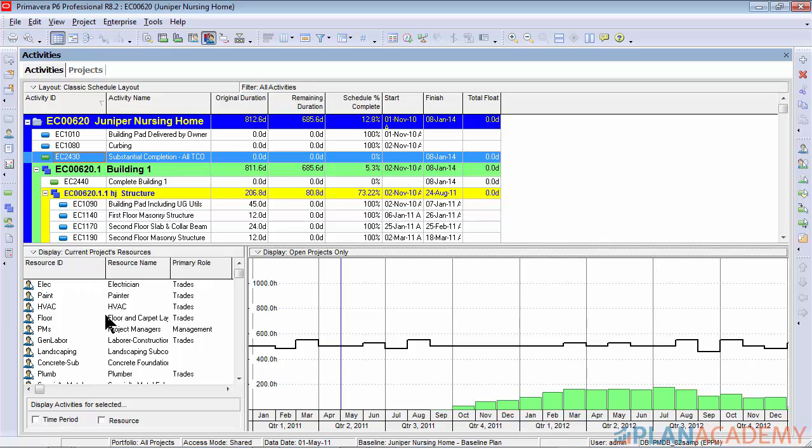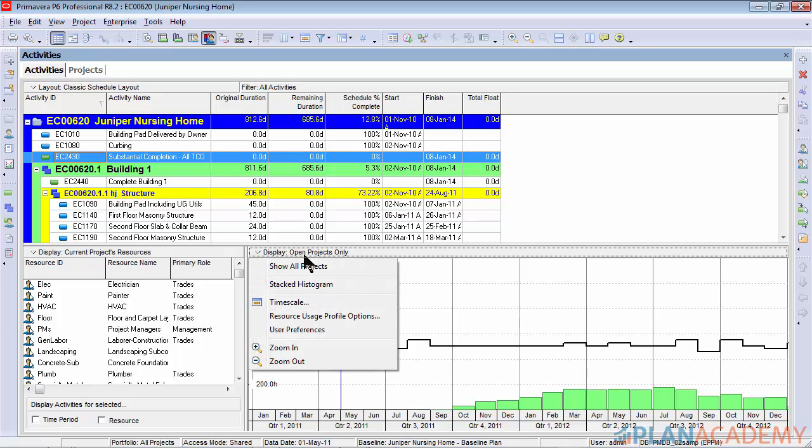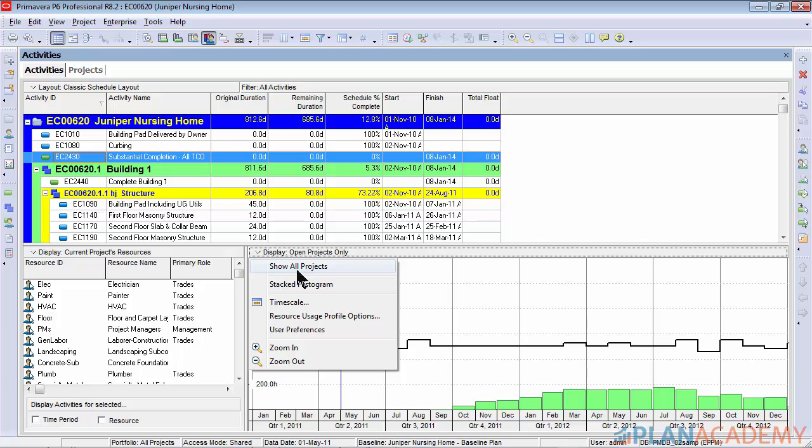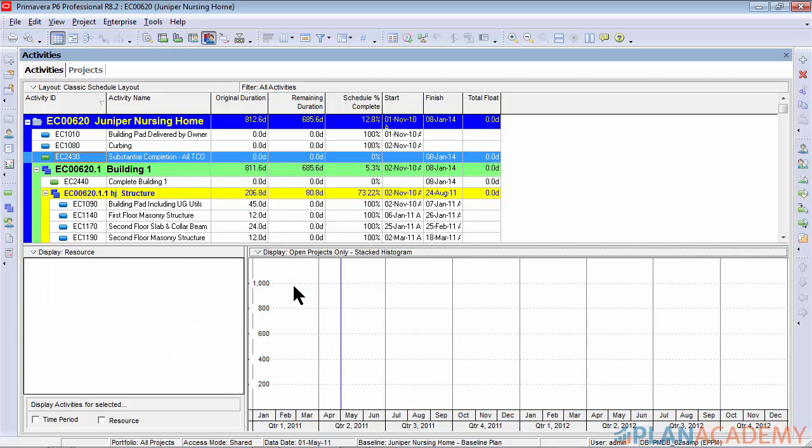Now that we've filtered on current project's resources, we want to set up our stacked histogram. To do that we'll click this right display bar and we will choose stacked histogram. Notice I don't have show all projects. I want to keep my resource display within the scope of just the project I have open, so we'll make sure that's unchecked and we'll check stacked histogram.